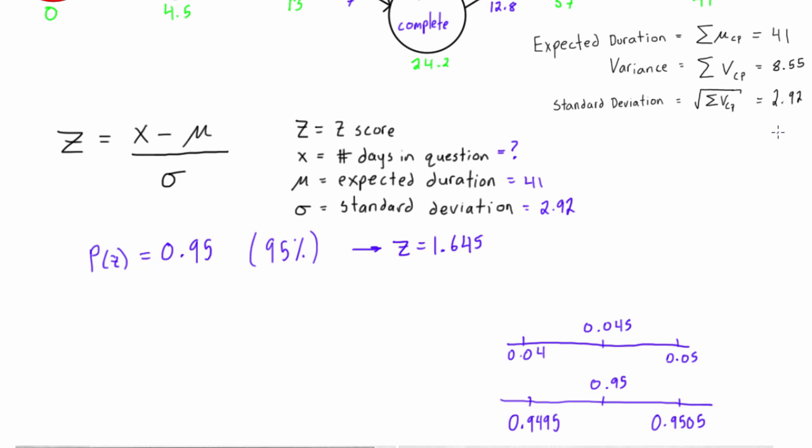Let's maybe switch colors so we can see what's going on. We'll use this equation: z equals (x minus μ) over σ. We know what z is: 1.645 is equal to (x minus 41) all over our standard deviation which is 2.92.